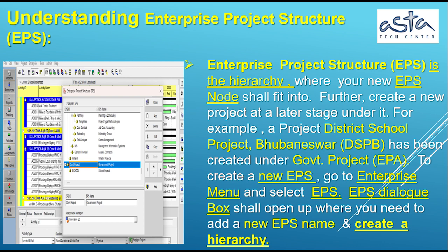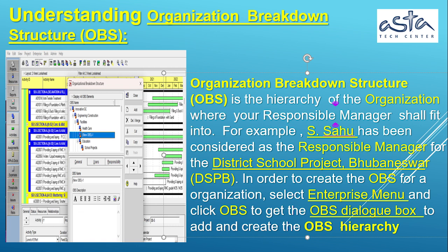To create a new EPS, go to the Enterprise menu and select EPS. The EPS dialog box will open up, where you need to add a new EPS, say, Government School Project as in our case, and if required the hierarchies are also to be done.